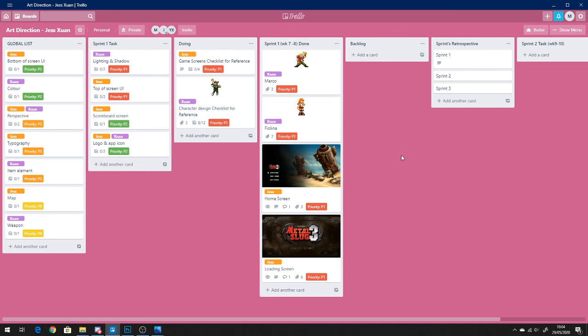So these are things that you want to break down. All this is process, so you cannot do it in 1 week, which is ridiculous. You have to prioritize, depending on the size of the team. You break down the tasks properly, you undertake them, and you agree upon the tasks. Then you put them under your sprint. Once you have agreed upon your tasks, you shouldn't add any more, unless it's an extreme emergency.